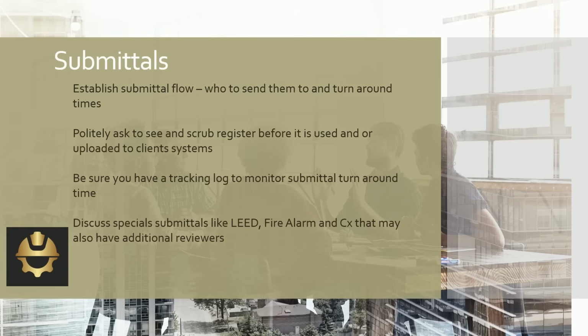And this mostly pertains to anything you're doing on a military base, DoD, Air Force, Marines, Navy, or any federal entity that has its own fire department. Yeah, they've got to review it. It's not actually governed by a city fire department, usually. That's right. So they've got to review it.